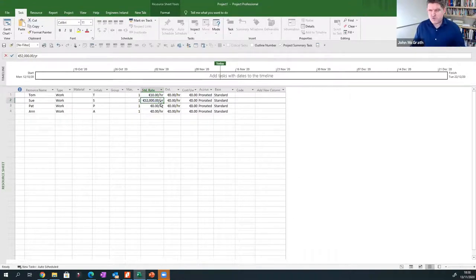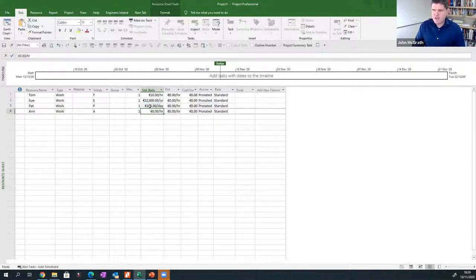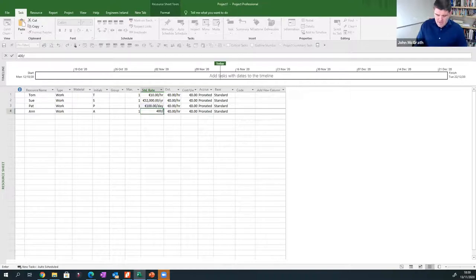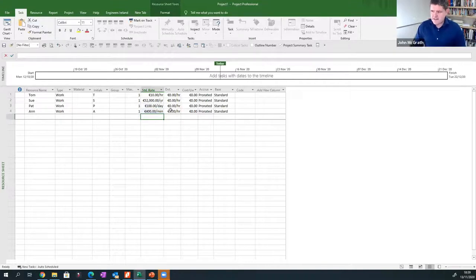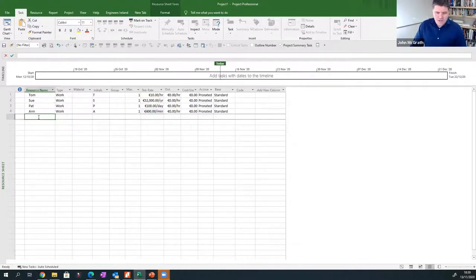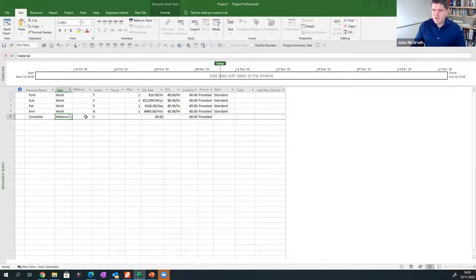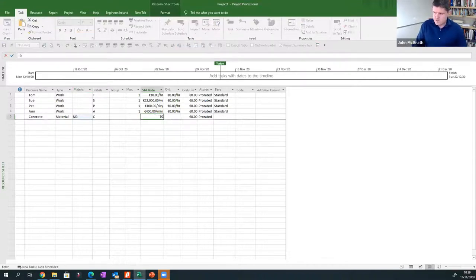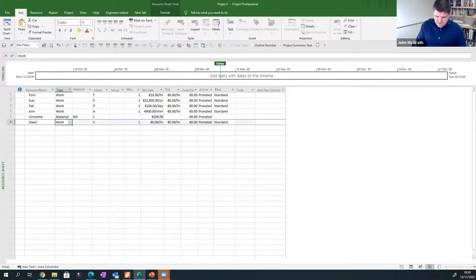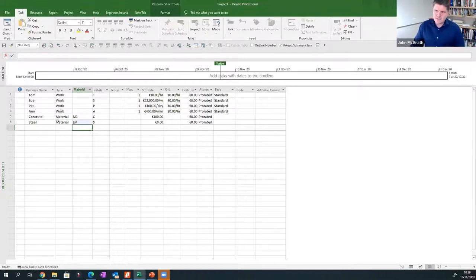I'm going to take a different view with Sue — I'll bill her at 52,000 a year to the project (52000/Y), which is an easy one: a thousand a week, 200 a day. Pat I'm going to put in as 100/D, billing Pat at a daily rate. And Ann — I'm going to make a classic mistake: I'm going to put in 4000 followed by a slash, meaning M for month, but I should have used MO. Ann has accidentally gone in as 400 euros per minute. Nice work if you can get it. I'm going to deliberately leave that mistake because it's going to come back and haunt me in a little while.